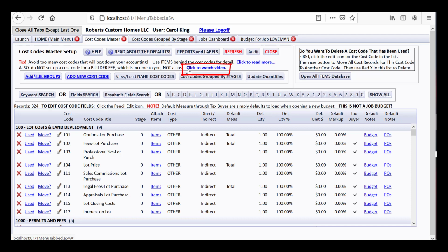It will show that cost plus buyer, the total costs, and then drop down and put the builder fee right after that. If you set it up as a cost code, you start causing yourself to want to put things into that builder fee cost code, so you're sort of faking checks to yourself, trying to get it so it's there as an actual cost as they look at their actual costs. But there's the draw request that is figuring out how much builder fee you've drawn, how much is going to be drawn on this certain draw request, and it's shown at the bottom and added to the cost that you're drawing. So please watch the video, and that will help you understand that a little bit better.